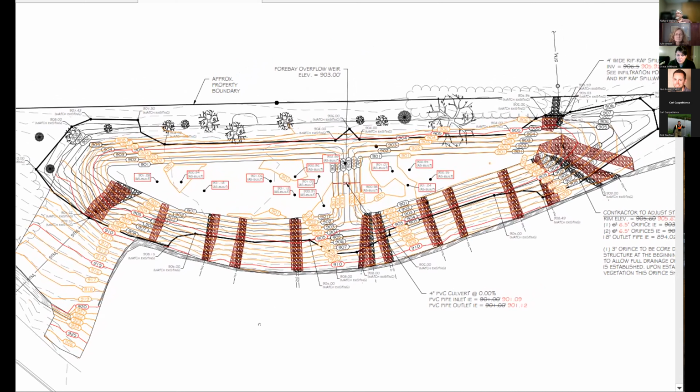We're in a retrofit situation now, so there's not really any room to do anything else. And I really hesitate to ask for more investigation, which may or may not even help when it's done. And if it did, it would be at great cost. I see this as a pretty small impact. So I told the contractor, the engineer, and the condo association that I thought this was the way to go, and I would seek your approval, and then we would move forward with this solution.